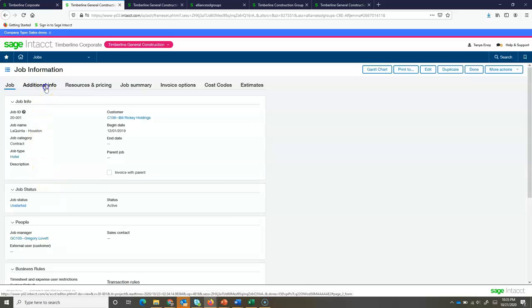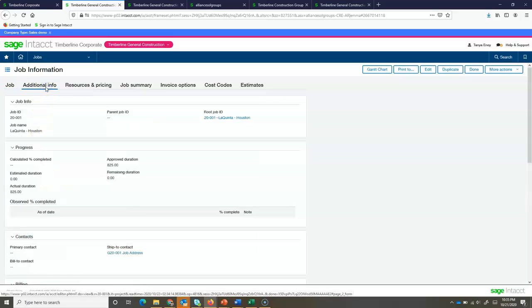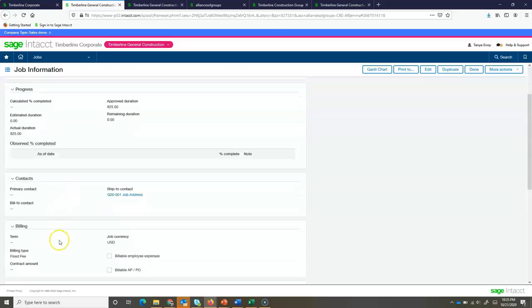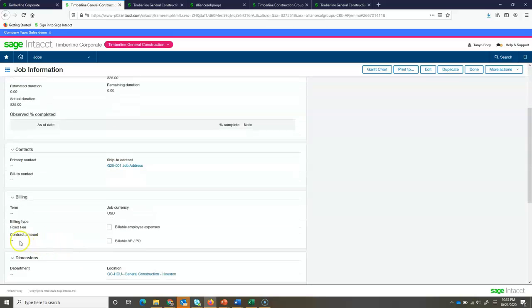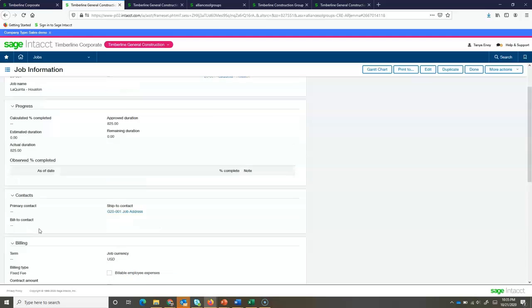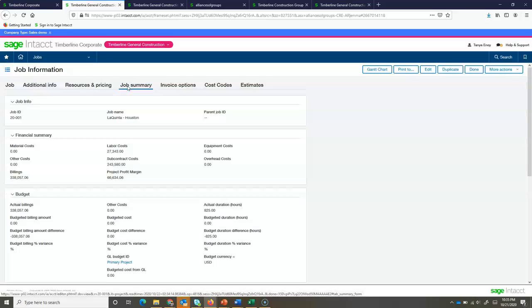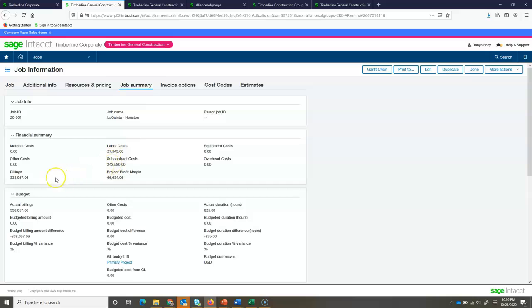Moving over to my additional information tab, I'm going to see the progress of the job. Now, we're not going to get into billing today, but this is going to be used in billing. We can see what type of billing this project is set up as. This is a fixed fee, but I can also do percent of completion, a time and materials job, or even a milestone billing project. My job summary screen is going to give me some financial summary information, letting me see how much I've spent in key categories like labor, subcontracts.